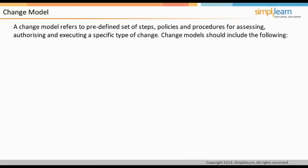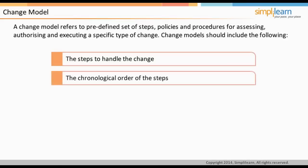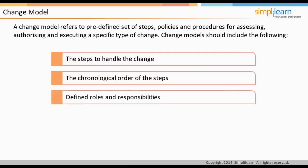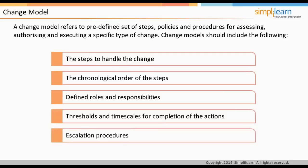A change model refers to a predefined set of steps, policies, and procedures for assessing, authorizing, and executing a specific type of change. Change models help to save costs, minimize risk, and improve the consistency of execution around changes. The change model should include: steps to handle changes including unexpected events and issues; the chronological order of those steps with dependencies defined; responsibilities — including identification of change authorities who will authorize the change and decide whether formal change evaluation is needed; thresholds and timescales for completion of actions; and escalation procedures including who should be contacted and when.